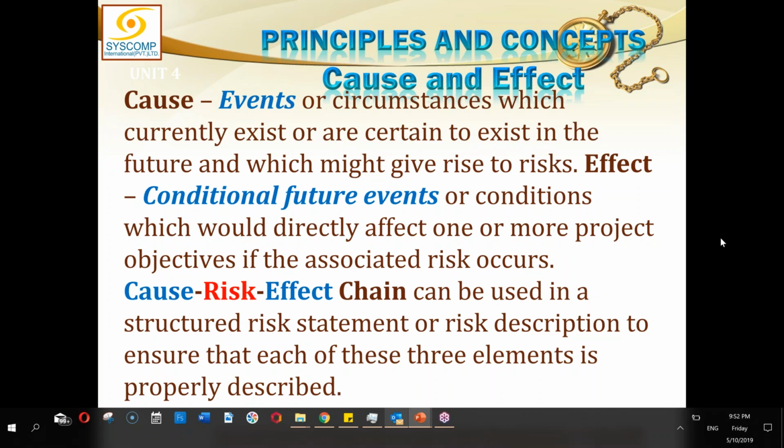We will have to take the cause as a risk for a moment and see, is the insulation not the risk? If insulation is the risk, then why is insulation so poor? You can go back a step and see why the insulation is so poor. Then you will find that due to hurried procurement of the wiring, the insulation was poor, and therefore something is happening.